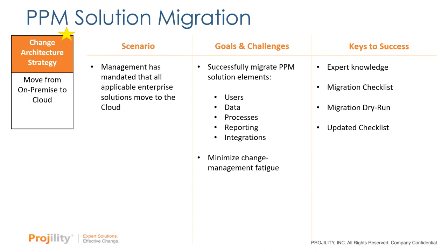And so you're also going to perform a migration dry run, and you're going to do this in a test environment that, hopefully, is a perfect match to your production solution. It's possible maybe it doesn't have the same data in it, but from a configuration standpoint, from a hardware standpoint, the software standpoint, they're identical.